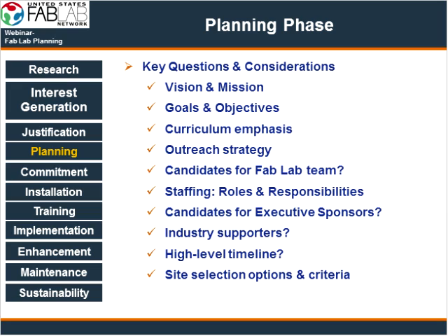This planning phase obviously needs to, we've talked about all the elements and key considerations, but you do need to translate this into a formal plan. In our startup kit, we can share some examples of that, but you obviously need to have the major activities and tasks across some kind of timeline, identifying where the potential facilities and the site of your Fab Lab would be.